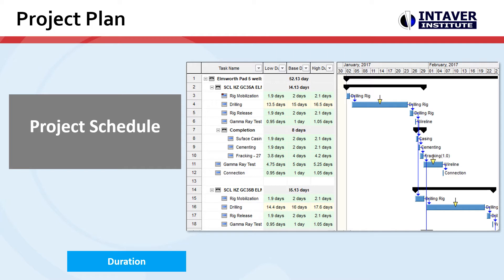If we're going to include cost analysis, for time-independent costs we can add fixed costs, and for time-dependent costs we can add resources.